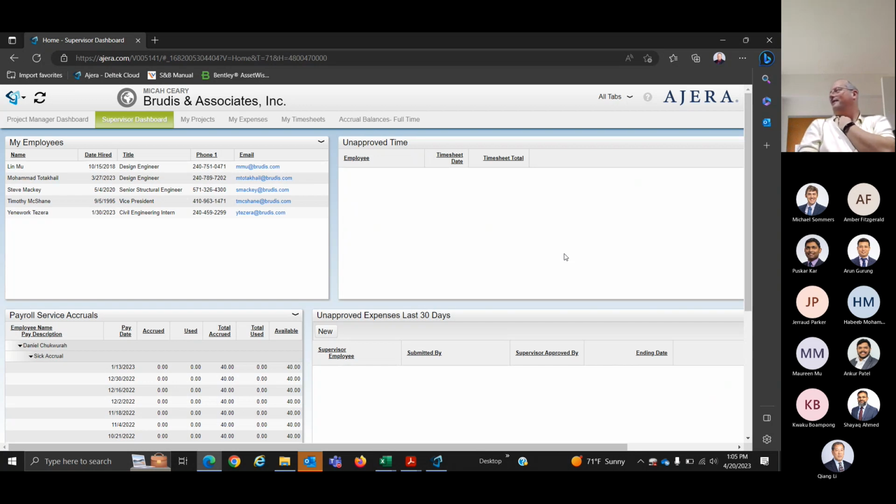I usually take the unspent remaining, divided by 200, and that gives you a rough idea of how many hours. With our overhead, I might be 230. He has an expensive group at the moment. We're working on getting that number down.